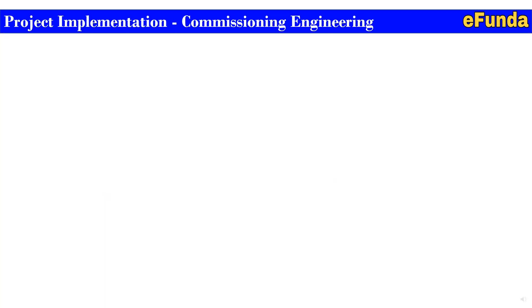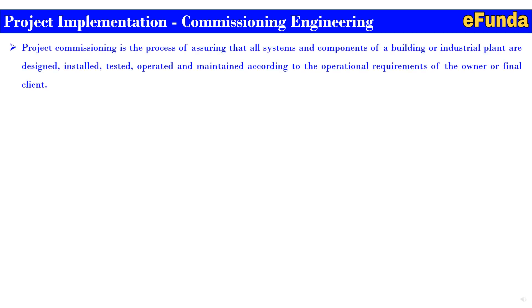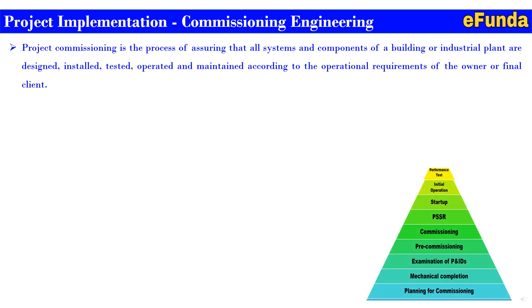Introduction to project implementation commissioning engineering: project commissioning is a process of assuring that all the systems and components of a building or industrial plant are designed, installed, tested, operated, and maintained according to the operational requirement of the owner or the final client. One can refer to the triangle where the planning for commissioning covers mechanical completion, examination of P&IDs, pre-commissioning, commissioning, PSSR, and startup.